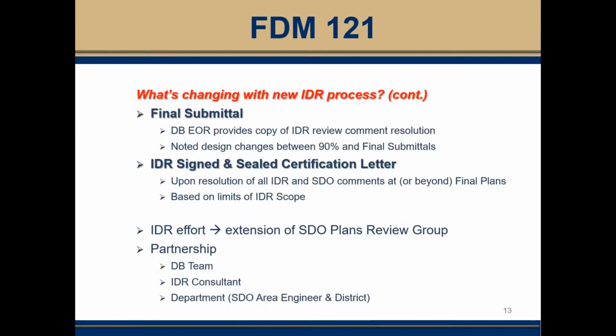When the final submittal arrives, the design build EOR will provide a copy of IDR review, comment resolution, and noted changes between 90% and final submittals. After resolution of all comments, the IDR consultant will provide a signed and sealed certification letter documenting compliance within the limits of their negotiated scope. This effort is considered an extension of the State Structures Design Office Plans Review Group and a partnership between the design build team, IDR consultant, and the department.